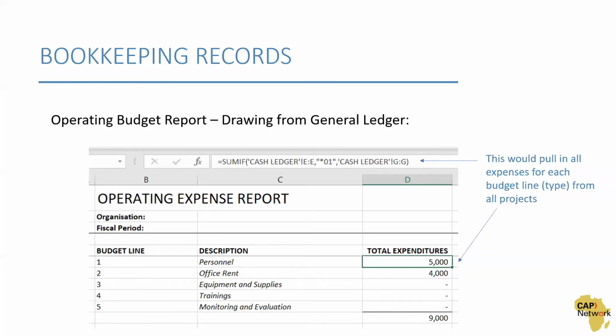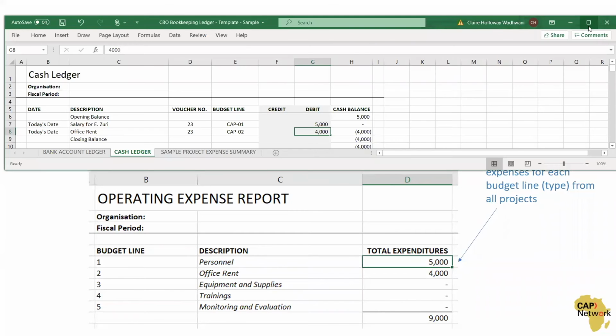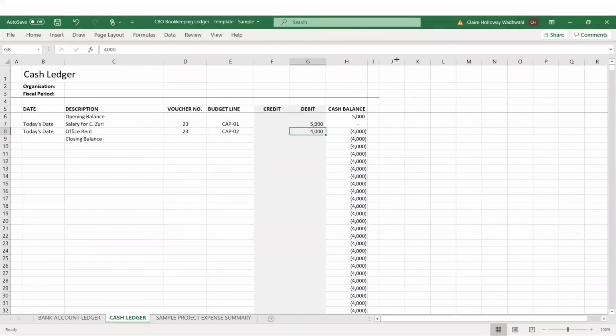And this can also be applicable to other budget lines, because in activities, we might have a number of items. You have talked about refreshments, we have talked about maybe transfer refund. So all of that can also be given a different unique code, so that once you want to see how much you'll spend on them and how much is the balance, it's also very possible.